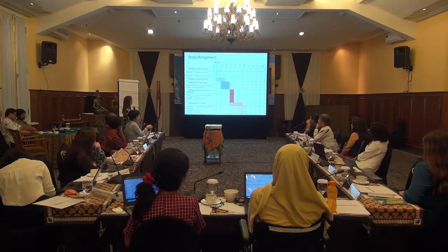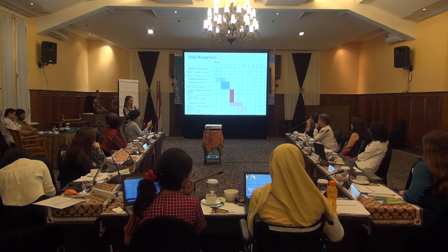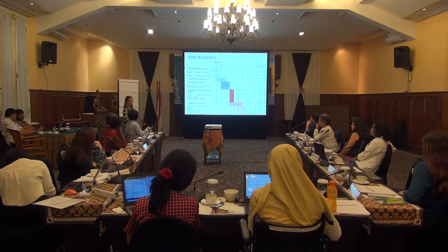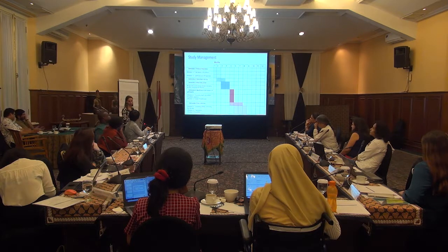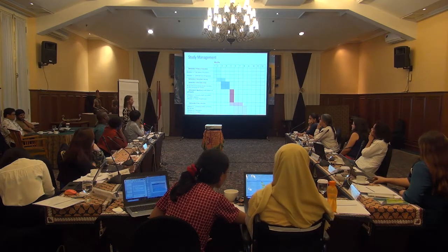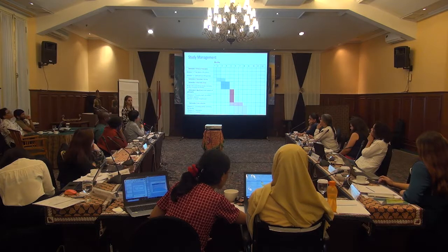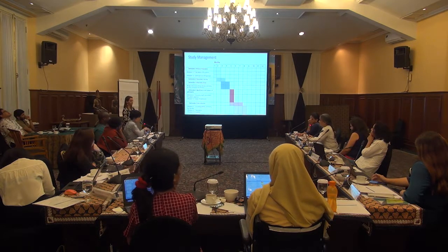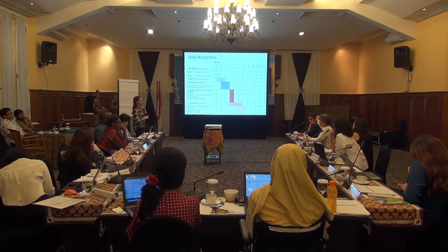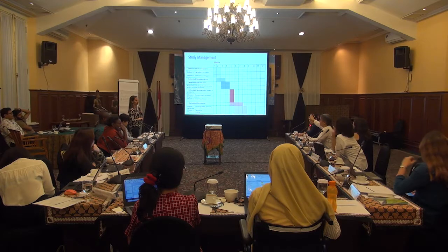I think it is also the same suggestion as the previous one from Dorothy, that 2 months can be too optimistic. But under the umbrella of the protocol finalization, I would suggest that you split into 2 different deliverables: first, protocol finalization, and the second one is approval by the IRB. Otherwise, month 1 for finalization and months 2 and 3 for this one, if you wish to keep it like this.